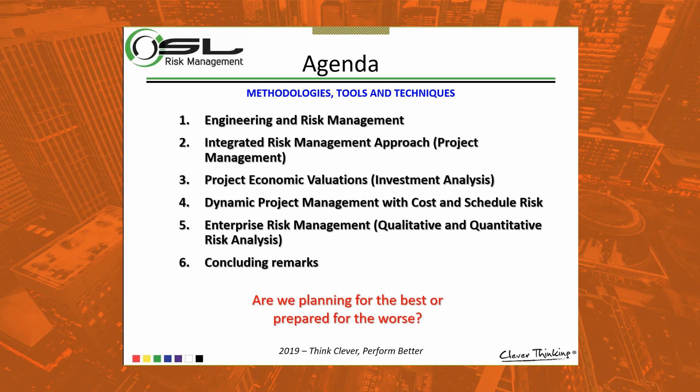The second area I want to share is the project economic evaluation, because as I mentioned, if you have delays in certain projects or you increase capital expenditure, you are hampering the NPV of the project or any other KPI the organization uses for assessing how well this project adds value to the firm or shareholders.